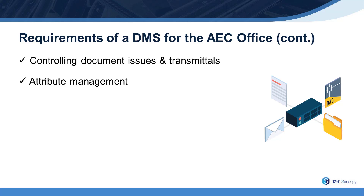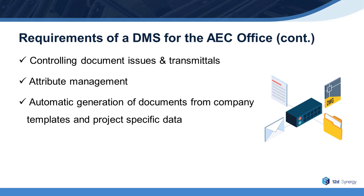Attribute management: besides managing documents, the DMS should also be able to manage project attributes or data — for example, project number — which can then be used in drawing title blocks, cover sheets and reports. The ability to manage data can facilitate the automatic generation of documents around company templates and project-specific data. For example, project-specific data such as the name of the council, the water authority, and an estimated finish date. If the finish date is varied, the DMS should be able to propagate this new information through all documents that reference this data.